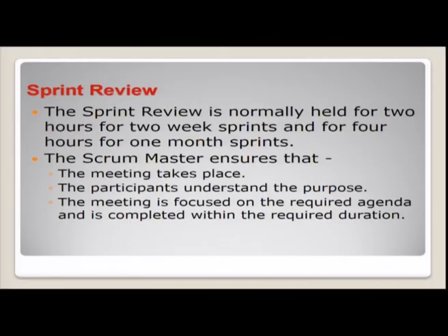So, in the sprint review meeting, the Scrum Master has to ensure that the meeting takes place. After the sprint, definitely there should be a sprint review meeting. The participants should understand the purpose of the meeting. The meeting is focused on the required agenda and it is to be completed within the required set duration. Sprint review includes the following aspects. Attendees include the Scrum team and key stakeholders as invited by the product owner.